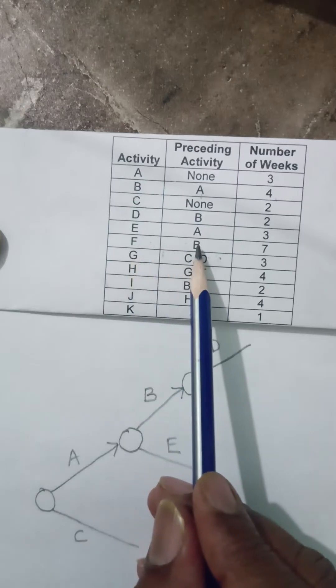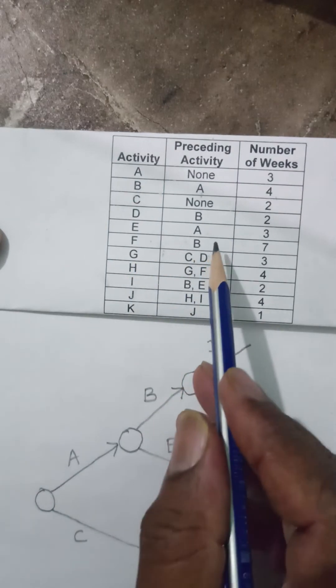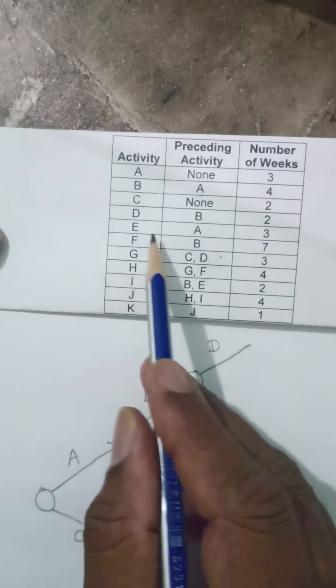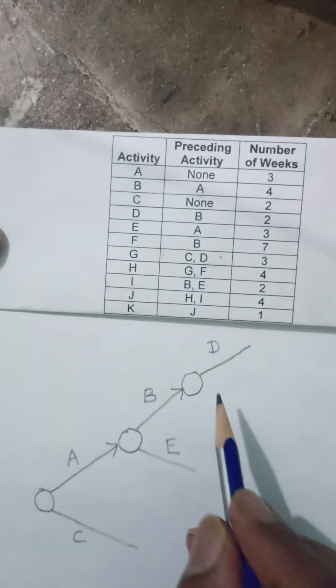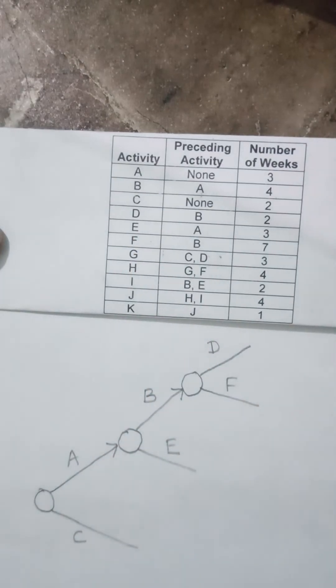F is starting after B. My B is there. B is giving rise to two activities, D and F. So I can write F here.